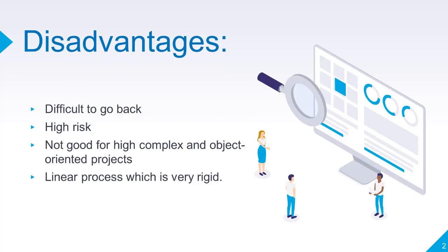What are some disadvantages of the waterfall model? Once an application is in the testing stage, it is difficult to go back and change something that was not well thought out in the concept stage. No working software is produced until late in the life cycle. That creates high amounts of risk and uncertainty at the software release. Not a good model for complex and object-oriented projects. Poor model for long and ongoing projects. Not suitable for projects where requirements are at moderate to high risk of changing. And it's a linear process that can be viewed as somewhat rigid.